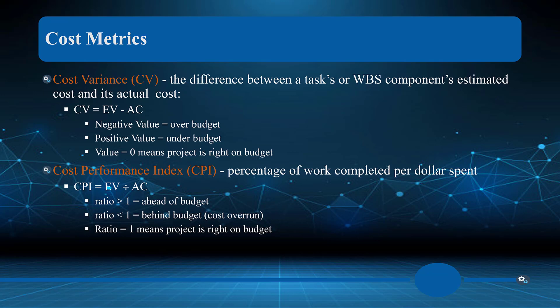Let's continue with part three of our cost metrics. We'll start by looking at cost variance, which is the difference between a task or work breakdown structure component's estimated cost and its actual cost. The earned value was six thousand and our actual cost was eight thousand — those are the numbers we're going to use. Remember, this isn't for the whole project; it's for a point in time.